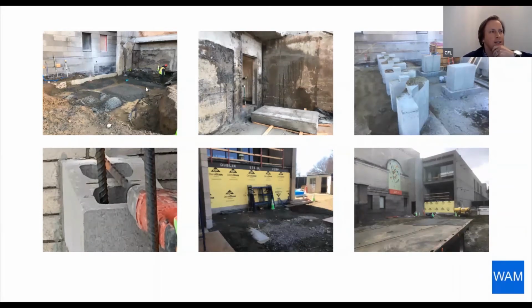One of the interesting outcomes of the excavation work was finding granite slabs from the old retaining wall just prior to the Higgins Education Wing. So when the 1898 building was installed, kind of across the mouth of the 1898 building, there used to be a granite retaining wall. And so when the Education Wing was built, of course, that retaining wall was demolished and then the remnants discarded into the site. So that's one of those things, from a planning perspective, that you can't always account for, that we had to pull out of the site.